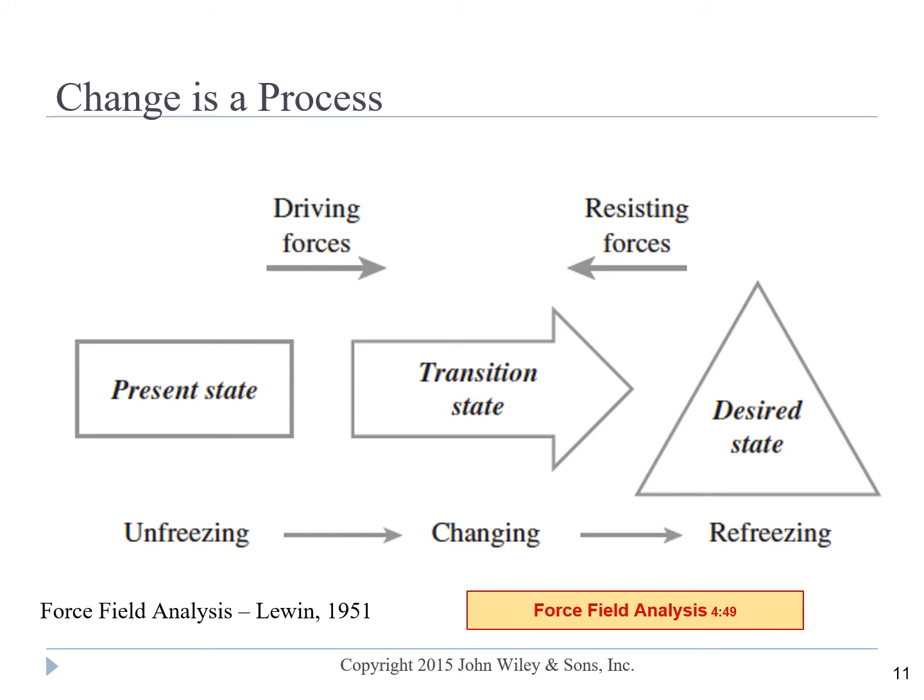And Lewin came up with this rather simple tool of force field analysis to look at the driving forces. Those are the forces that are actually supportive of this change, and they would like to see this change occur in the organization, versus looking also at the resisting forces.